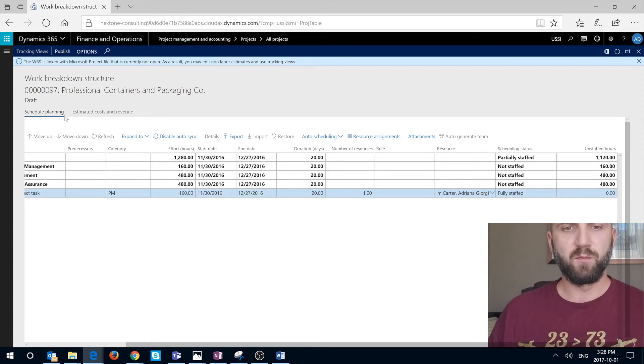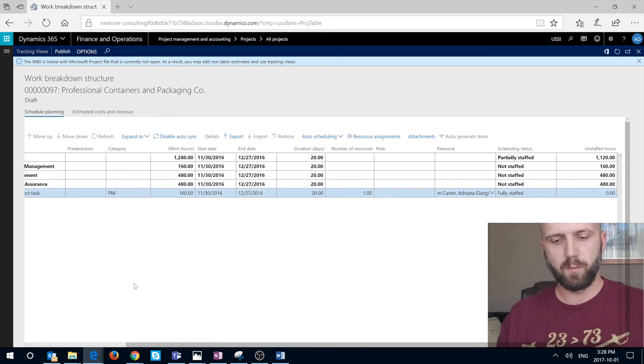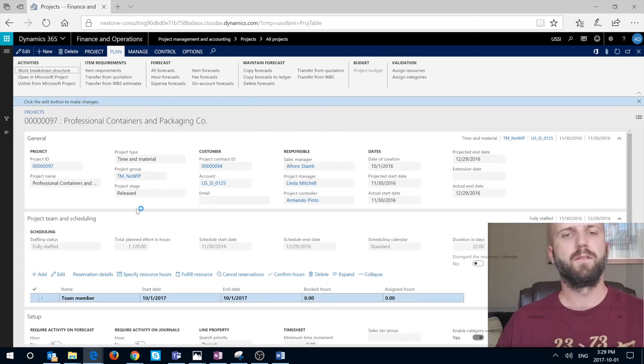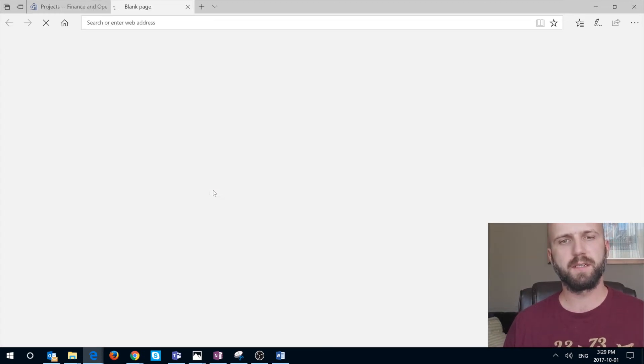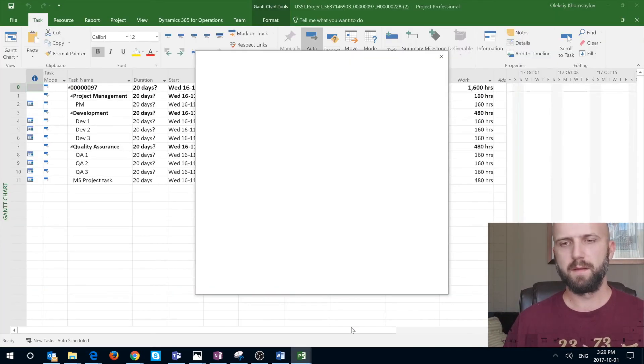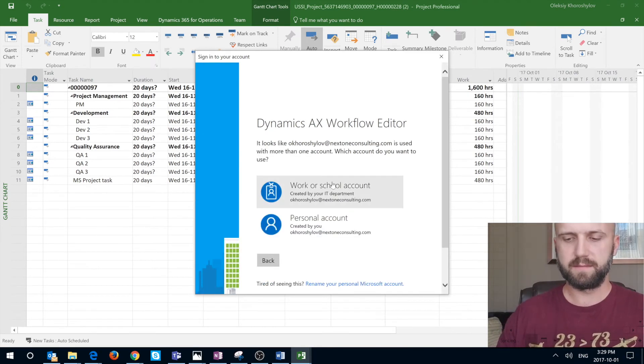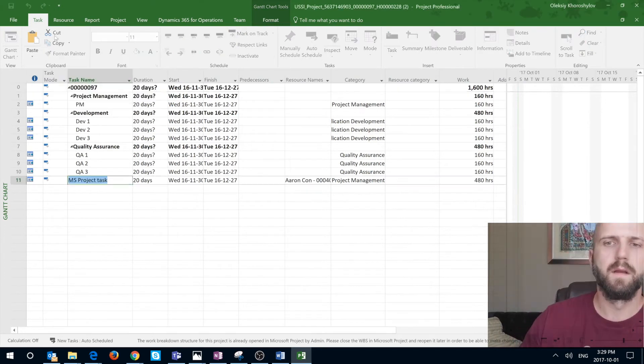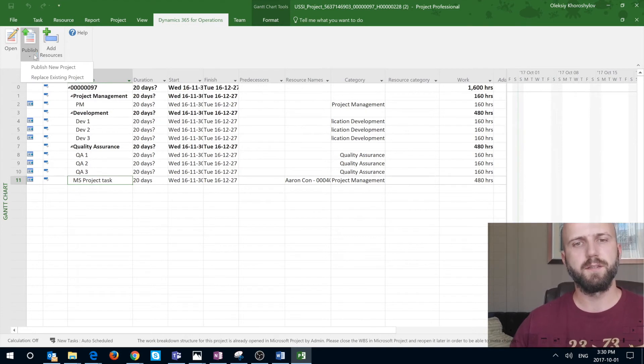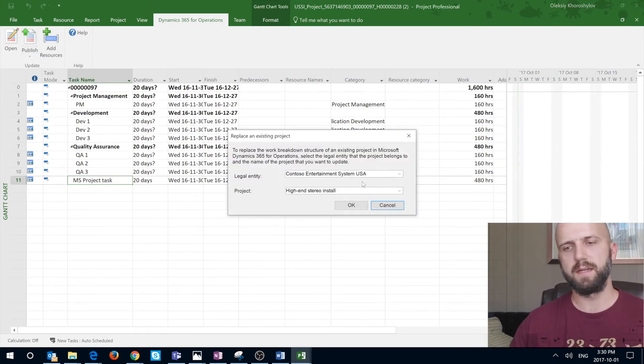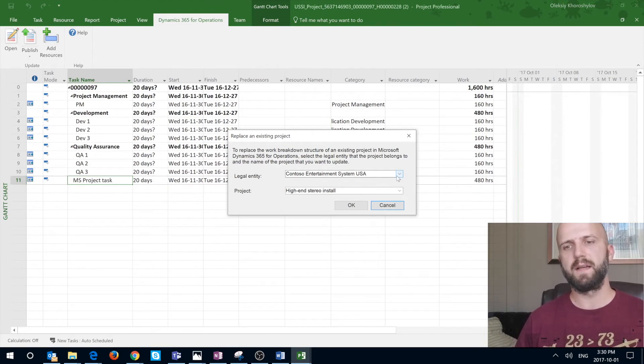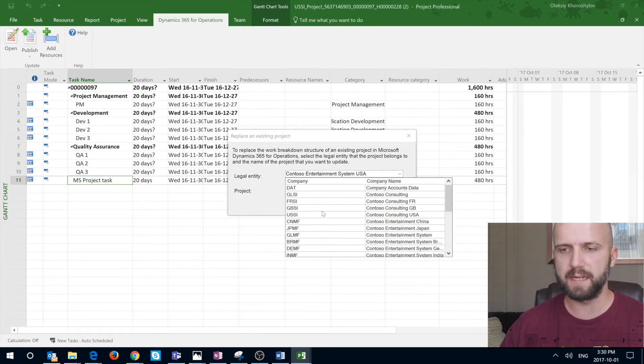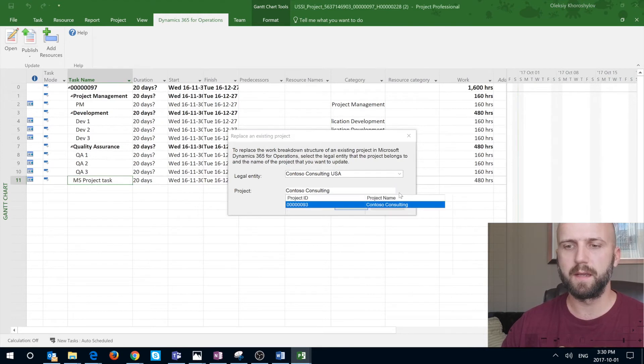The other way that didn't work for me was actually using the publish button in the Microsoft Project client itself. For that, I will open my project in the client right now. Same project, click on the button, open that file. I have to enter my email again. It takes a few moments to synchronize again. I'm going to click on the publish button right now. And you have an option published to a new project or an existing project. I'm going to select the second option and it's going to give me again, first of all, it doesn't really know that it's already linked to an existing project. It's asking me to pick that project again. So I have to pick my correct company and then pick correct project.